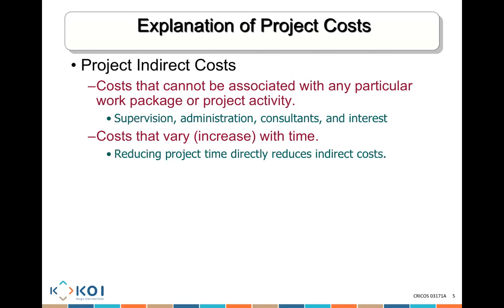If I pay up my debt for the project earlier, I'm going to pay less interest. All of these are indirect costs. So if the project finishes earlier, my cost, especially my indirect cost, is going to decrease. If it runs longer, I'll have to pay more supervision, more administration, more consultancy, and that's going to cost me more money.